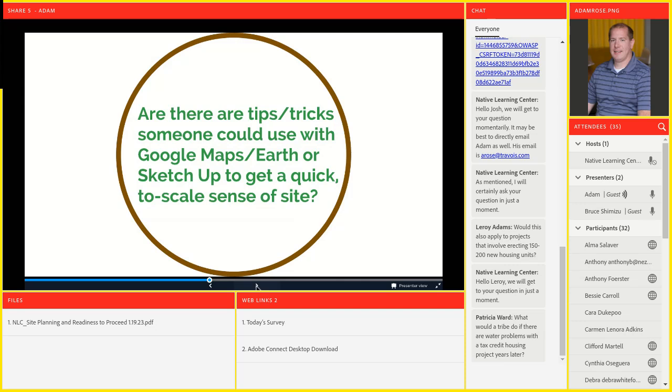So they went to their civil engineer and their architect and said, hey, here's all the information we've gathered. We know the utility providers. We know where the easements are. We had a conversation with the roads department and the land department, and they were able to tell us that there's a power line that runs through the middle of the property. All of that information became the baseline for the professionals to start their work and either verify it or say, oh, that's slightly a misinterpretation of the information.